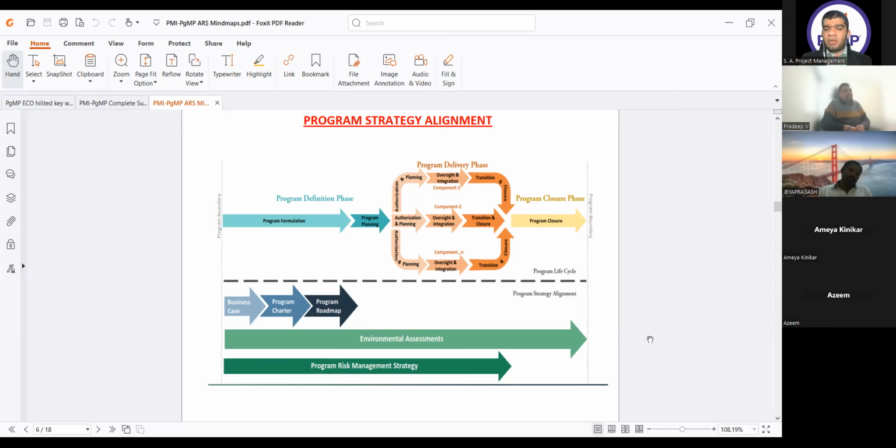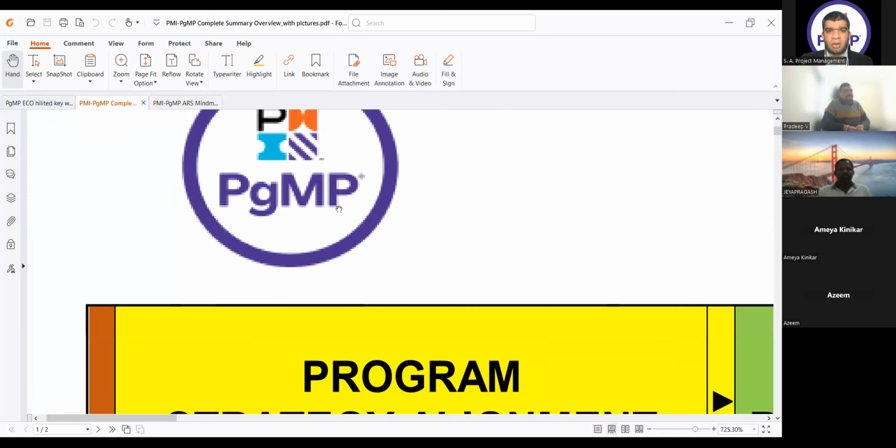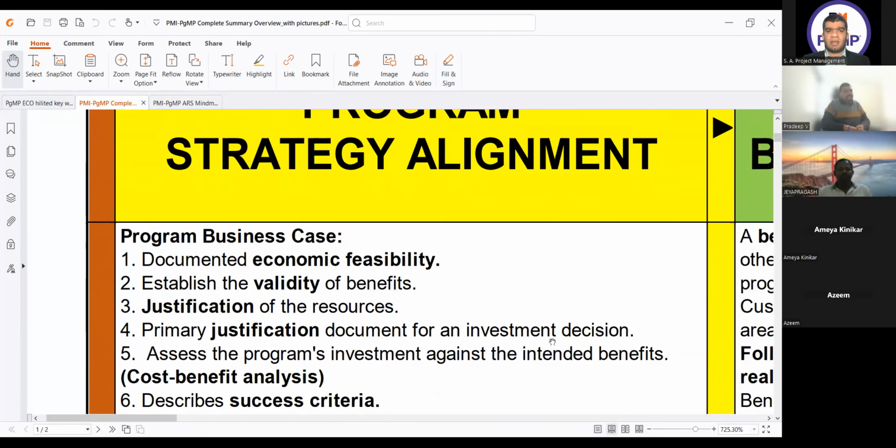First step is that he should review, he should analyze the situation, and then subsequently he can make a change request or he can escalate to the steering committee if he is not able to handle it by himself. But the first step cannot be to escalate to the steering committee. These are the very important concepts throughout this strategic alignment domain and overall in the program lifecycle. If this is clear, then I will go to the keywords of the business case.